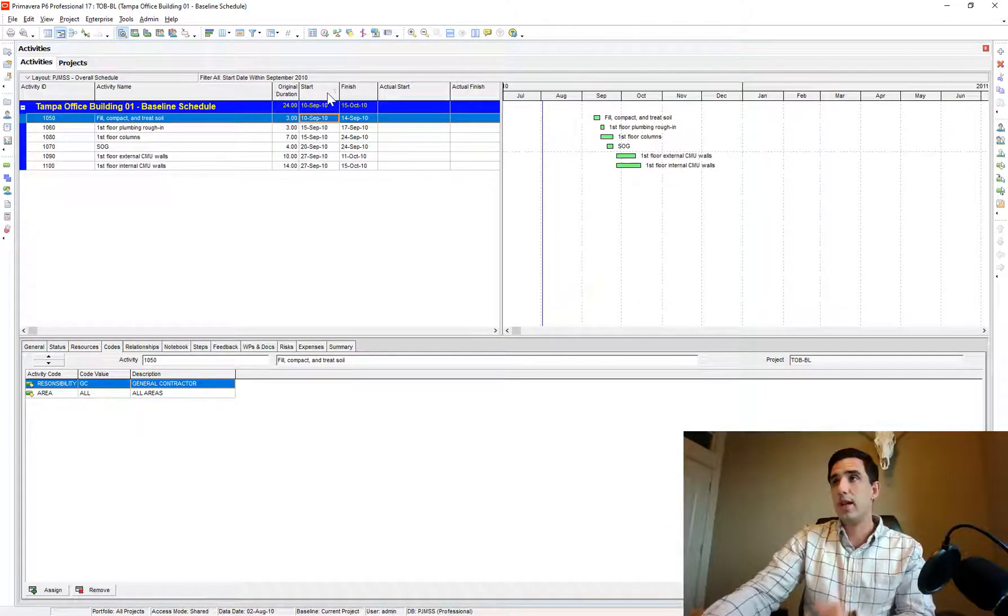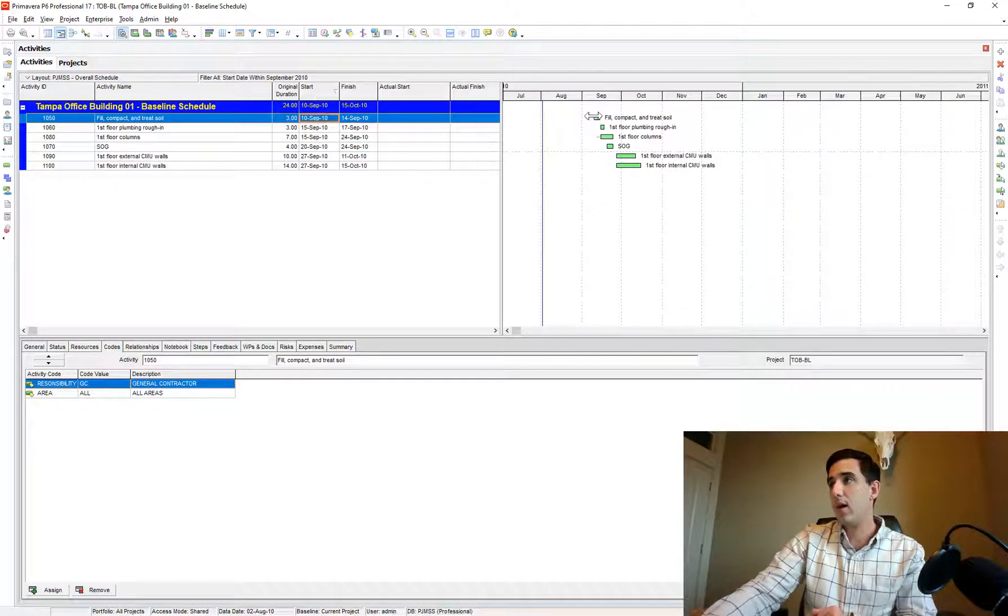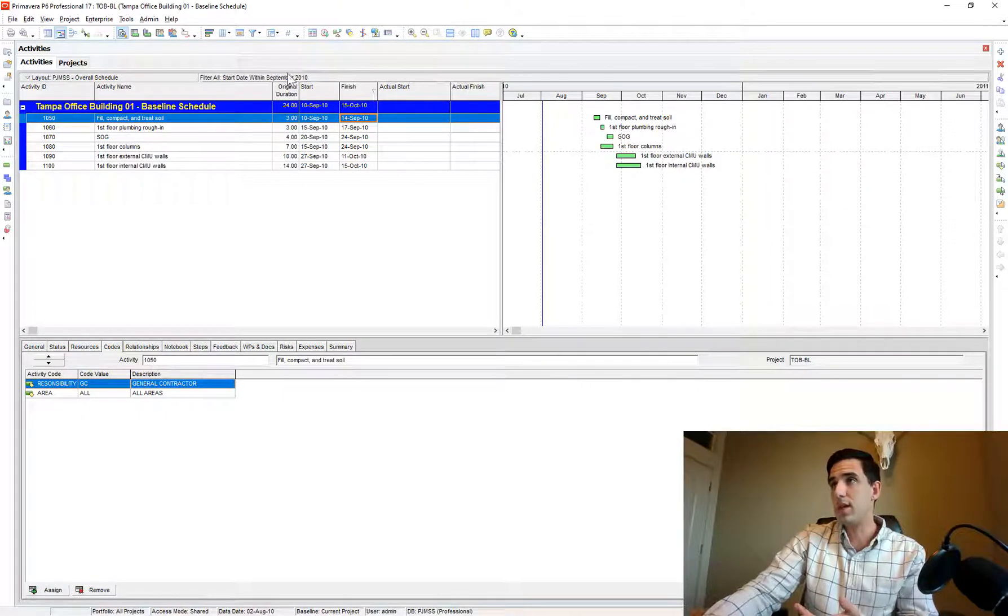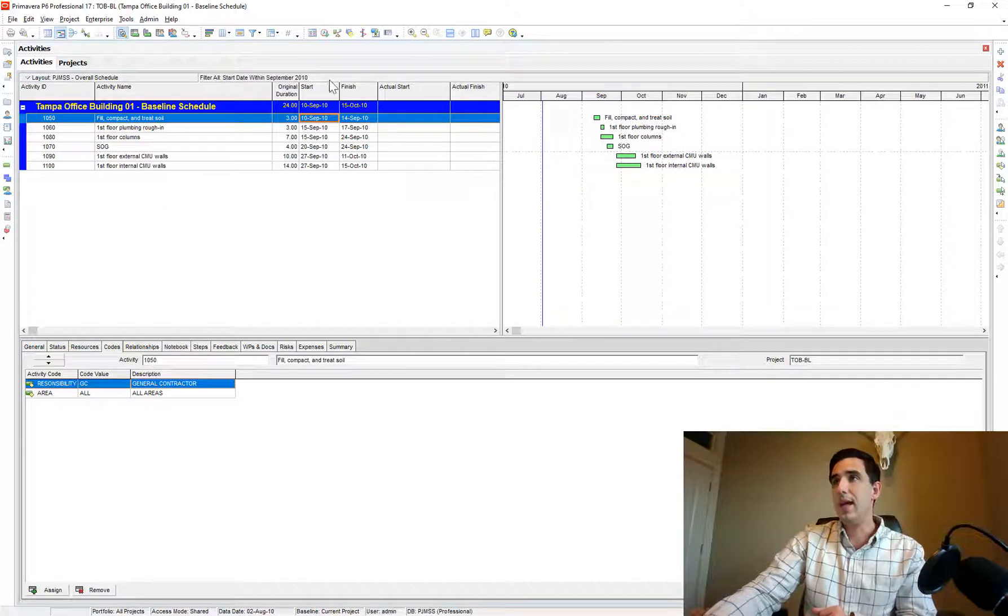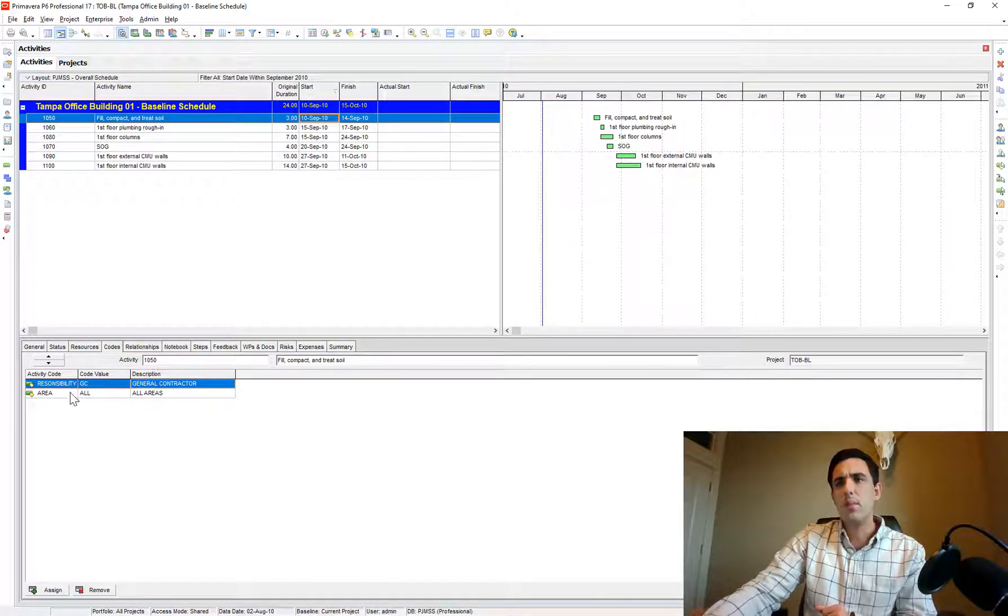You can just click the start date here on that column and that automatically sorts it by start date. Or you could do it by finish date, so whichever column you end up clicking on, it's going to sort it by that date.